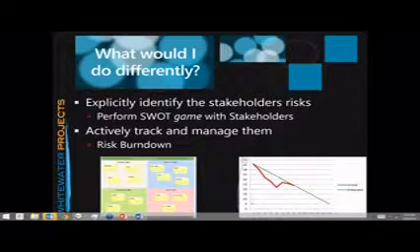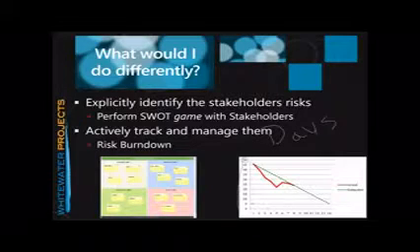I prefer this to be a generic thing because some risks are in days, but some are in dollars, right? Because if I'm doing software and I have to order a server, or I have to allocate new cloud space for new servers, that's not going to delay my project very long, right? I can whip out a PO for cloud space pretty quick, but it's going to cost me. It's going to have significant impact on the dollars associated with the project. So I want to make sure that we understand both in delay and in dollars, and so we create this generic number. Now you have to be careful that everyone understands what those numbers mean.